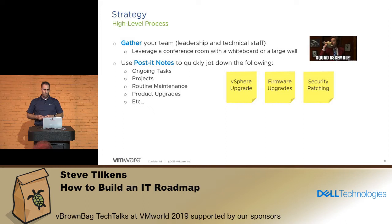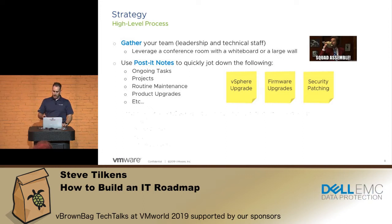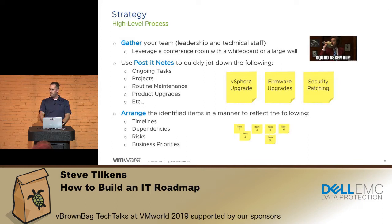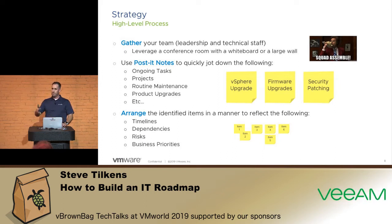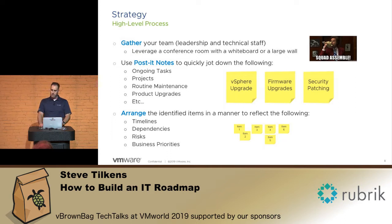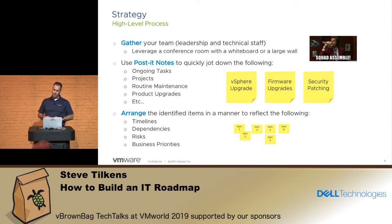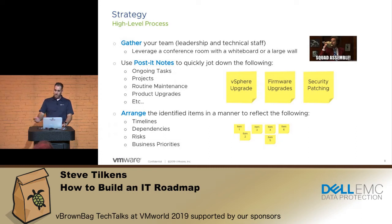Don't worry about putting these in any logical order at first — just get them written down and on the wall. Then the next step is putting them in a particular order, in some kind of chronological sequence. You'll identify dependencies — for instance, if you need to do a vSphere upgrade from 6 to 6.5 but your hardware doesn't support 6.5, obviously you need to do a hardware refresh first. You'll also build in business priorities. I used to support an accounting firm that did taxes, and during tax season they said no changes — so we focused on enablement. The roadmap needs to account for those business constraints.